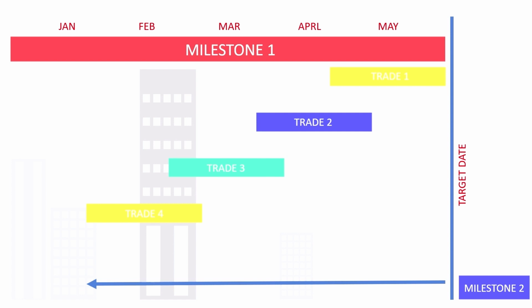Pulling is to only do work that releases work requested by someone else. This rule reduces the waste of overproduction. With pull planning, the teams plan, then do, and check for each target phase. Under this phase schedule is the look-ahead plan, or the make-ready plans.